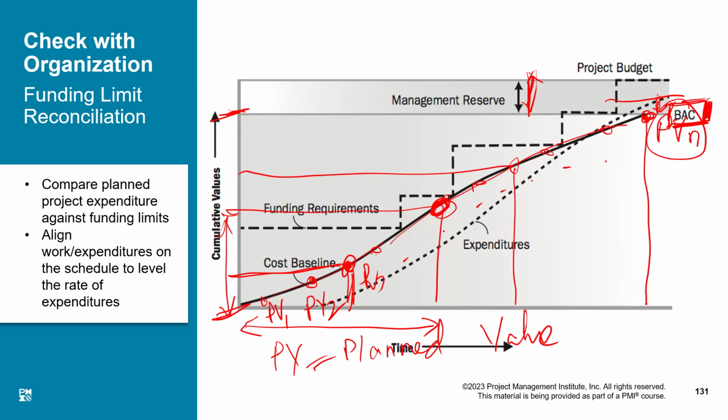Okay, so you are fine with the idea of the S curve. Each point on the S curve is called a planned value, and that is different from the previous. So it is increasing continuously in the shape of an S curve. Why? The cost is rising slowly in the beginning, then getting to its peak around here, and then again slows down for the rest of the project.